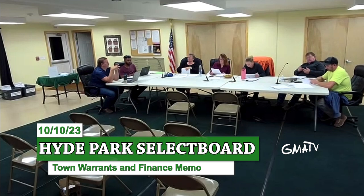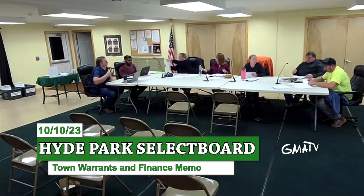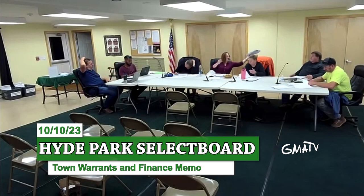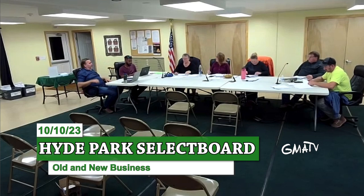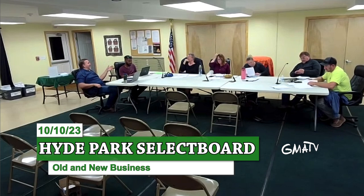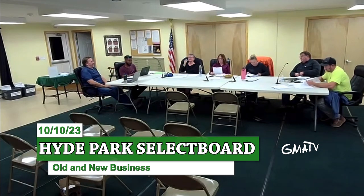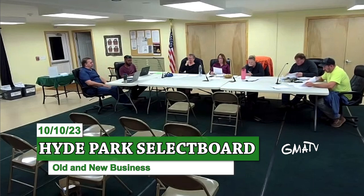So that number could be an appropriation from ARPA. We could do it with the Town Buildings Fund, which was created back in March for all town buildings, including GVH. But it's better to use ARPA just because we have that money now and we need it to cover that. I know there was an intention for the GVH building, back in 2020 when the select board said we don't want to spend local tax dollars on that. I think that's still a theme of that project. Luckily, the ARPA came back on top of that for doors and windows. So that would be a direction to Jen to obligate and spend the overage from the ARPA funds, and she'll create an account for that.